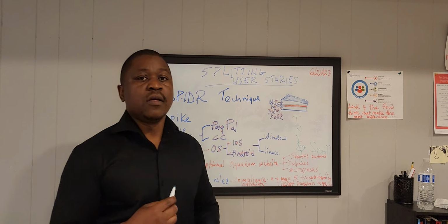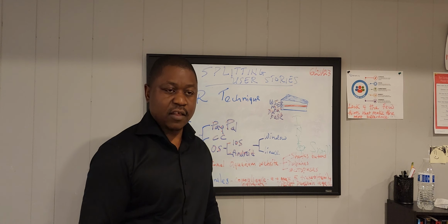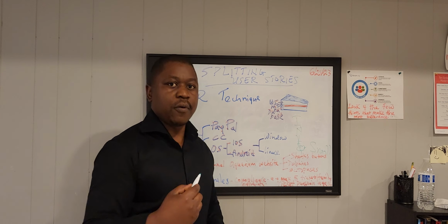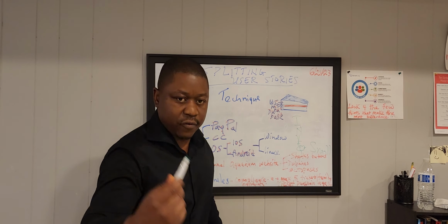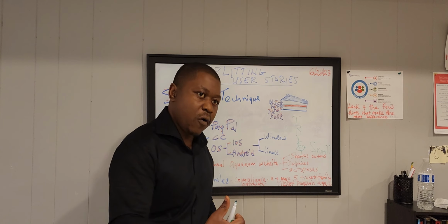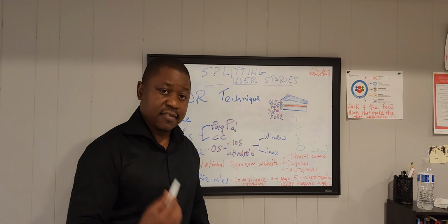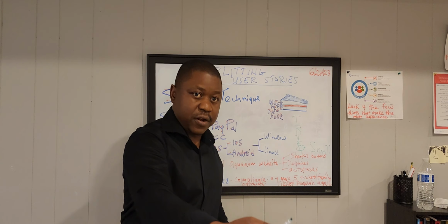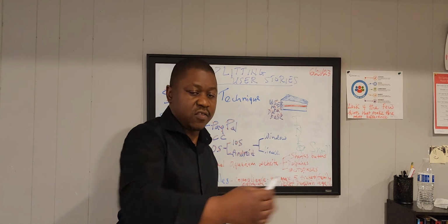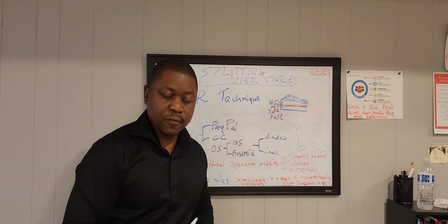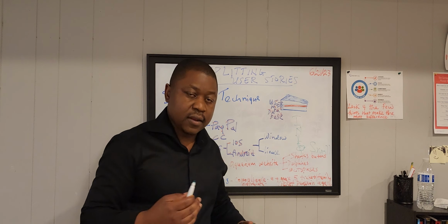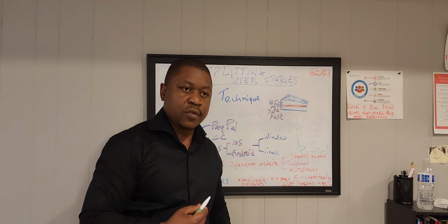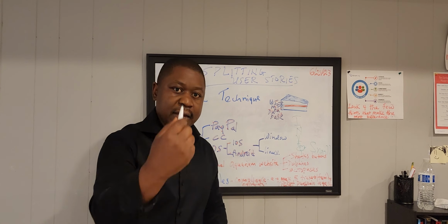Number one, so that it's less complex. The smaller it is, the less complex it is, so it can be finished up real quick and released. And if it's also very small, then there's a higher probability that that user story is going to be finished up and we're going to have feedback on it from the stakeholders during the sprint demo, for example. And then if there are any changes to be made, we can always adapt that change in the next sprint. So the smaller the user story, the better.